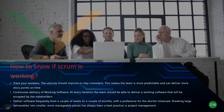Now we've talked a lot about Scrum ceremonies, priorities, artifacts, and debt — but how do you know if Scrum is actually working for you? It's simple: you track your numbers. If the velocity is improving or at least staying constant sprint over sprint, that means the team is predictable, it's delivering story points on time, and Scrum is working for you.